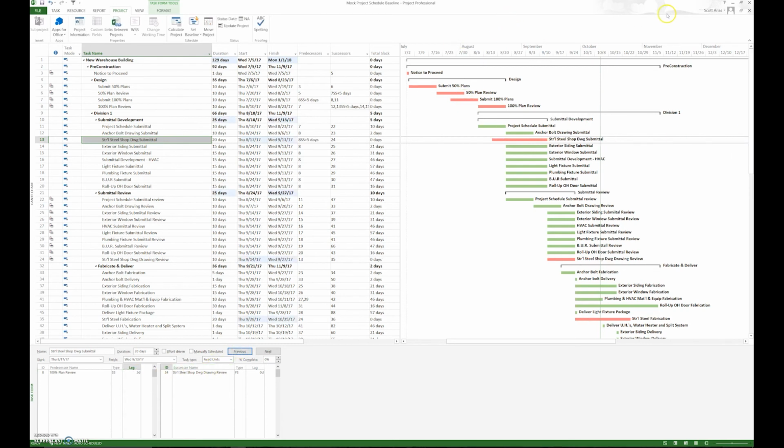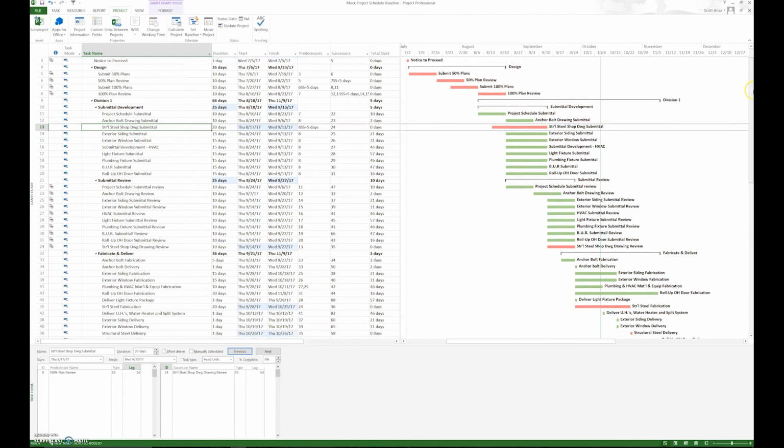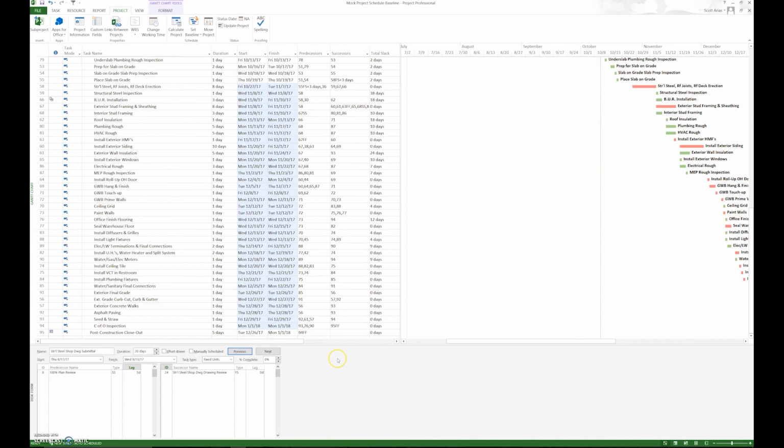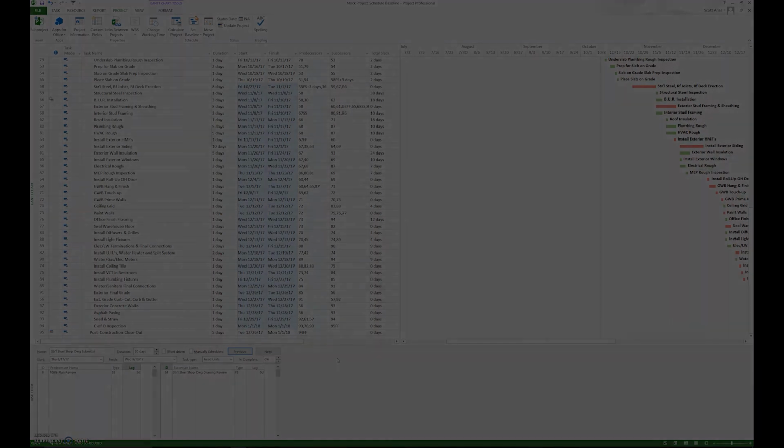And you could see when we had a closed network, we could simply look at the float, and we now know that the project can be done in that time frame. That's what's wonderful about having a closed network: you're able to use the float to tell you what tasks you need to reduce in order to get the project compressed to fit in that time frame. So remember, project compression is getting a project schedule you put together with all the logic in it to fit into the time frame allotted.